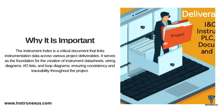Now let's cover why it's so important. The Instrument Index is the critical document that links all your instrumentation data across the various project deliverables. Think of it as the master reference document, or the single source of truth. It serves as the foundation for creating almost all your other key documents. Your instrument data sheets are generated from it, your wiring diagrams reference it, your I/O lists are derived from it, and your loop diagrams are drawn based on its contents. By using this single central document, you ensure consistency and traceability throughout the entire project. If a tag exists, it must be in the index, which prevents costly errors and mismatches down the line.